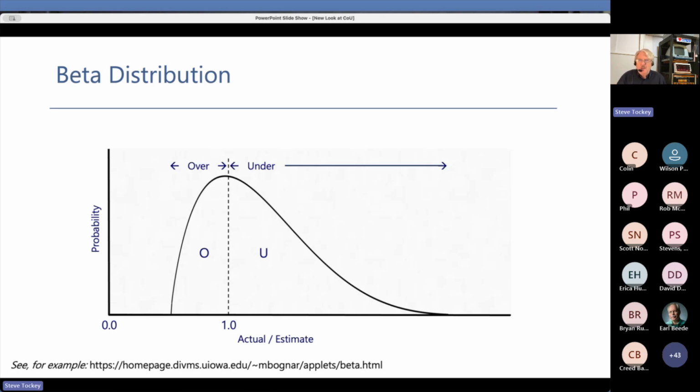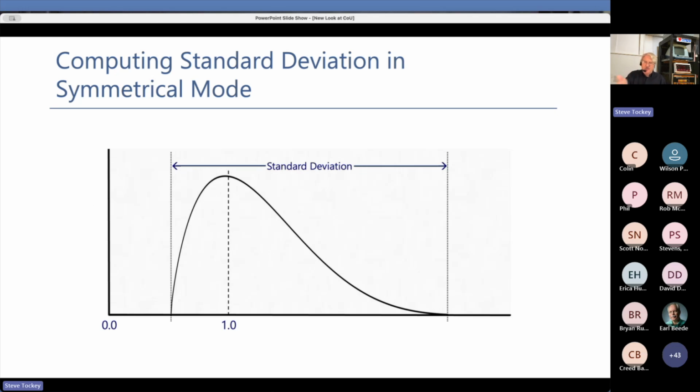So the point then becomes, if I just do a single standard deviation, it's skewed. Let's just say for a certain organization at a certain point in time that the standard deviation comes out 0.42. If I took a 10-week estimate, because it's one standard deviation plus and minus, there's a 68% chance that the project, mathematically, if it really was a Gaussian normal distribution, would be between 5.8 and 14.2 weeks.